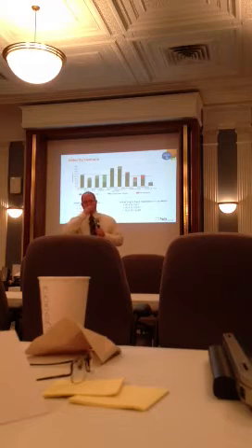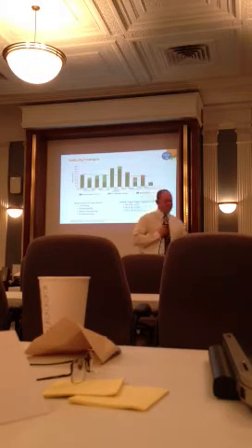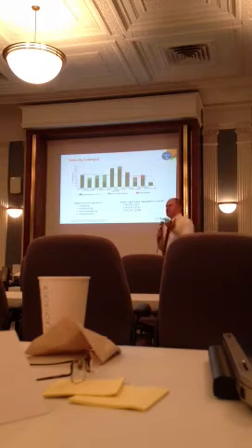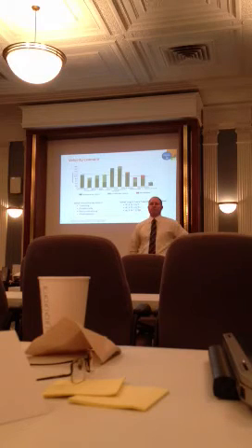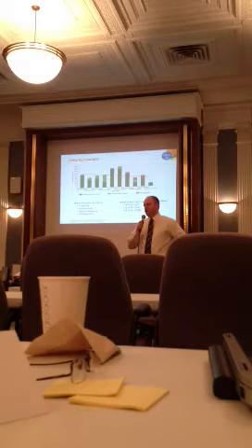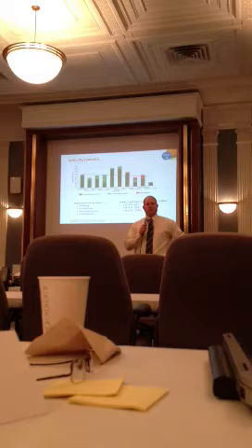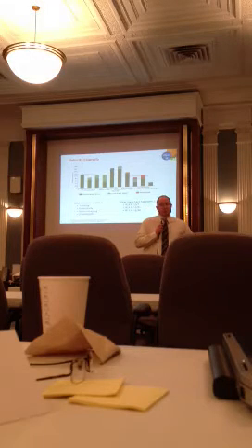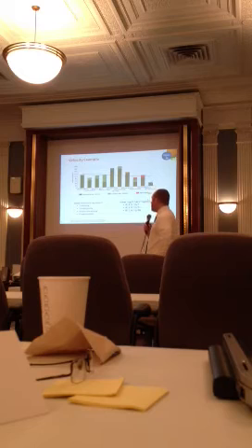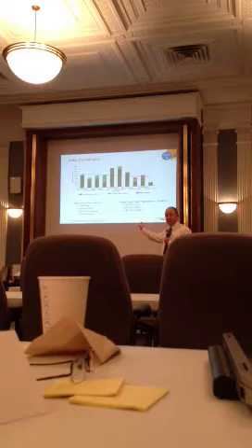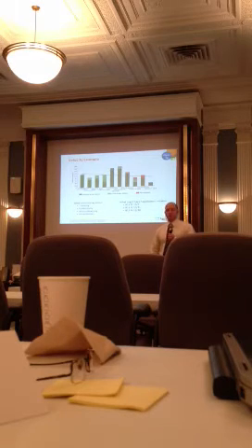So now let me ask you guys a question. It is the middle of February, and I have my whole team there, right? How many story points should my team commit to? 100. 100. 110? I heard 105? 100. To me, that sounds pretty predictable, right? 100 to 115 sounds pretty predictable to me. And that's why I would say that even though my graph looks like this, based on the real-world stuff that we had to deal with, I think my team is pretty predictable.